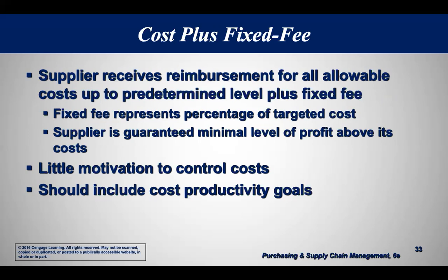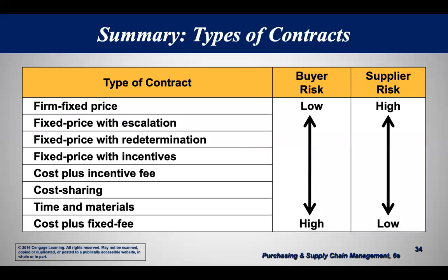Now, if I say I'll pay you 20% fee, that's different. That's cost plus percentage of cost, or then cost plus fixed fee. So you can make the fee a couple of different ways. So here's how it all kind of goes together.